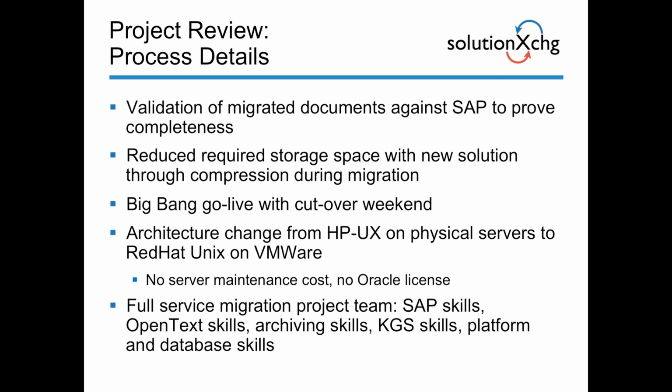In detail, what we did for the migration, we validated all migrated documents against SAP to prove completeness. We reduced the required storage space with a new solution through compression during the migration. We organized the cutover as a big bang go live with a cutover weekend.